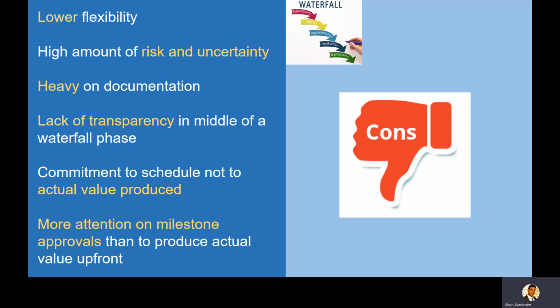Lack of transparency, because the customer is not aware whatsoever, because he cannot see a working product when you are in the design phase, or in the development phase, until we reach the testing phase, which is where some of the customers may be involved as part of user acceptance testing. So hence, lack of transparency.